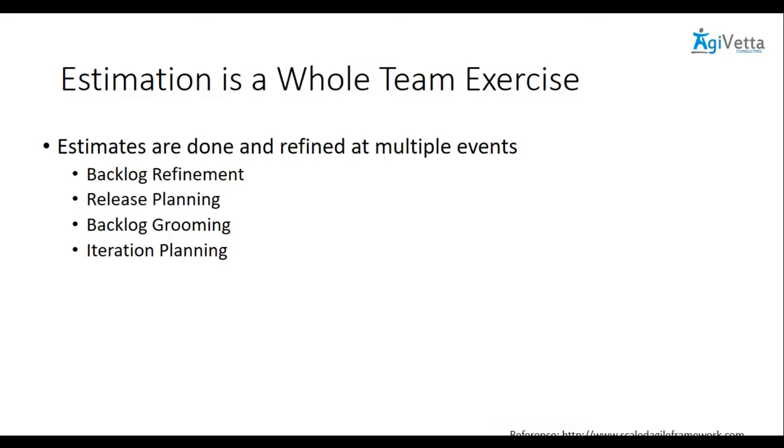Is it good to estimate again? It depends. It depends definitely on the organization, the customer, the stakeholders. For the right thing, yes, why not? Until you've started working on it, you don't have a good understanding. Go ahead, you can estimate. You might come to know that you estimated it as an 8 story point story, but now, having some story done in the last sprint by some other team, you can reuse much of the code there, and you can probably do it in much less time.